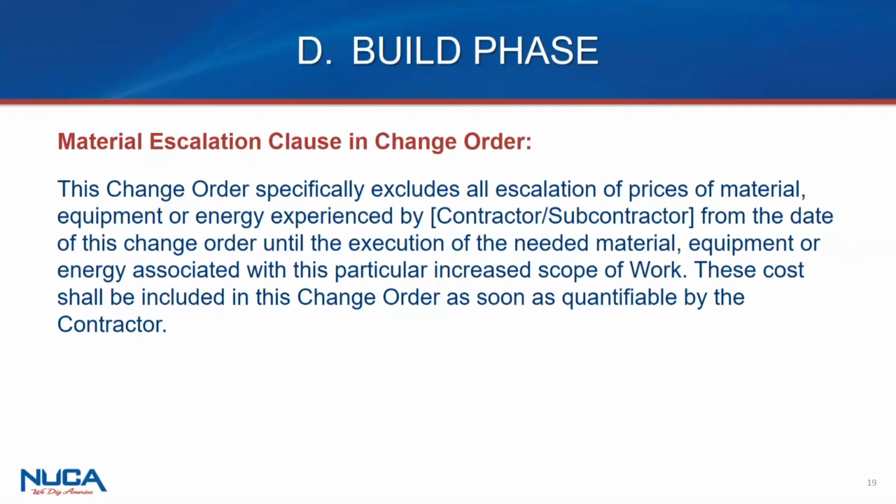I had a client once where he was following the notice provisions in his contract and putting the owner on notice through the construction manager every time there was an issue. And eventually he was called out in a meeting and it was said he's trying to be litigious. He's trying to set people up for a claim. So I had him do a $0 change order that just took out from the contract any notice provisions of a claim. We'll just work it out in the old-fashioned way at the end of the job.